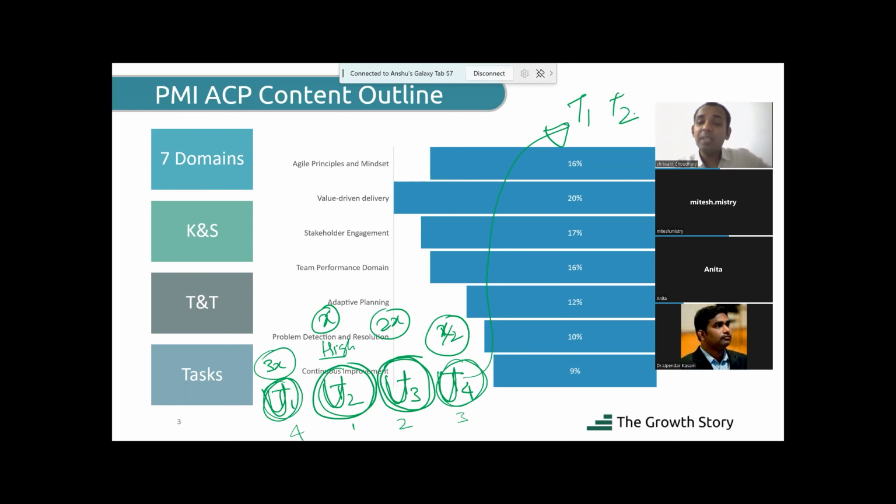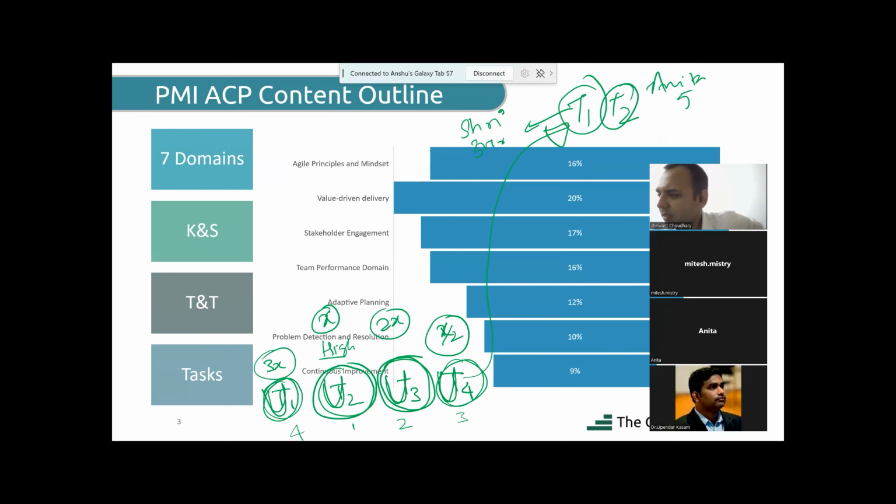And therefore, how much time is expected to do the task? So I will say, hey, Shriwant, you will do this in 1 hour or one day, whatever. And now we have the exact absolute estimate. Say this is Shriwant, and it will take 3 hours. This is Anita, and this will take 5 hours.